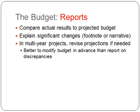So I called up the program officer at the foundation and told her what our predicament was. She said, "That's absolutely fine. I understand that sometimes things don't go the way they go. But are you positive that an additional 6 months will be enough? Because I can give you 1 extension, but I can't give you 2." And I said, yes, we were confident that in an additional 6 months, that is 9 months from the date I called her, we would be done. And so she gave me the extension, my program staff finished the project, and we were able to report on a successful completed project.